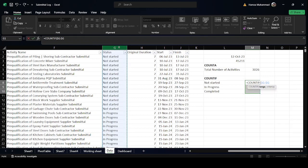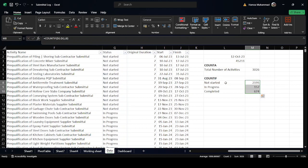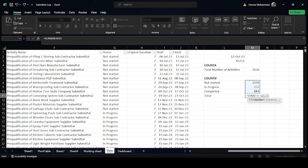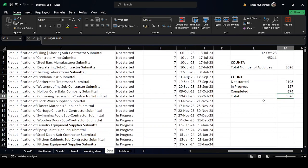We select column G as our range, press F4 to lock it, and our criteria is the status value in column L. We press Ctrl+Enter so the cursor stays in the same cell and the formula copies to all selected cells simultaneously. The results show 2195 activities not yet started, 157 in progress, and 624 completed — totaling 3026, which matches our COUNTA result.